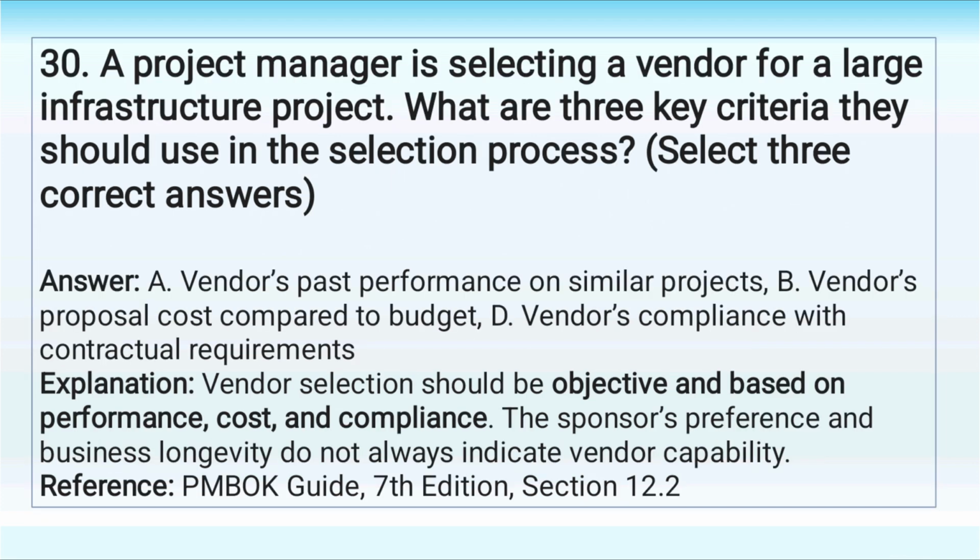Answer: A. Vendor's past performance on similar projects. B. Vendor's proposal cost compared to budget. D. Vendor's compliance with contractual requirements. Explanation: Vendor selection should be objective and based on performance, cost, and compliance. The sponsor's preference and business longevity do not always indicate vendor capability.